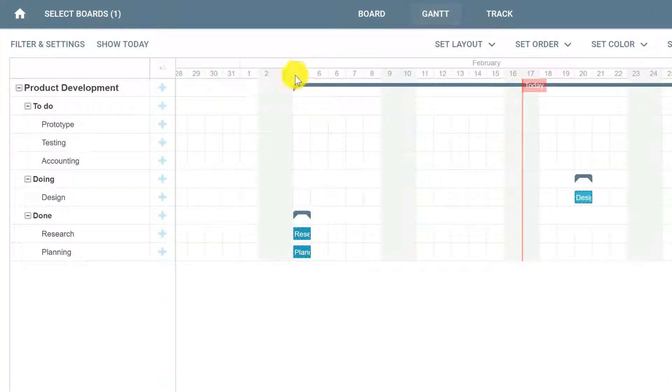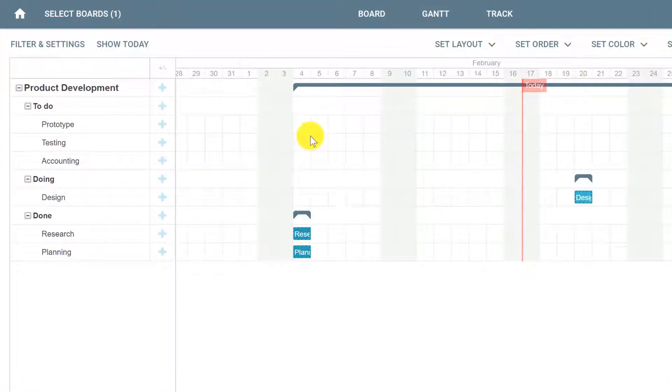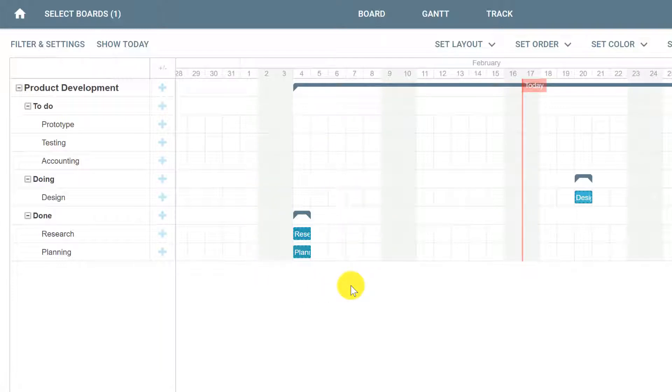The Gantt view will show you a list of cards and a timeline. Cards that have a due date will automatically appear on your Gantt chart with a one-day duration by default, but this can be changed by planning your cards on your Gantt chart.